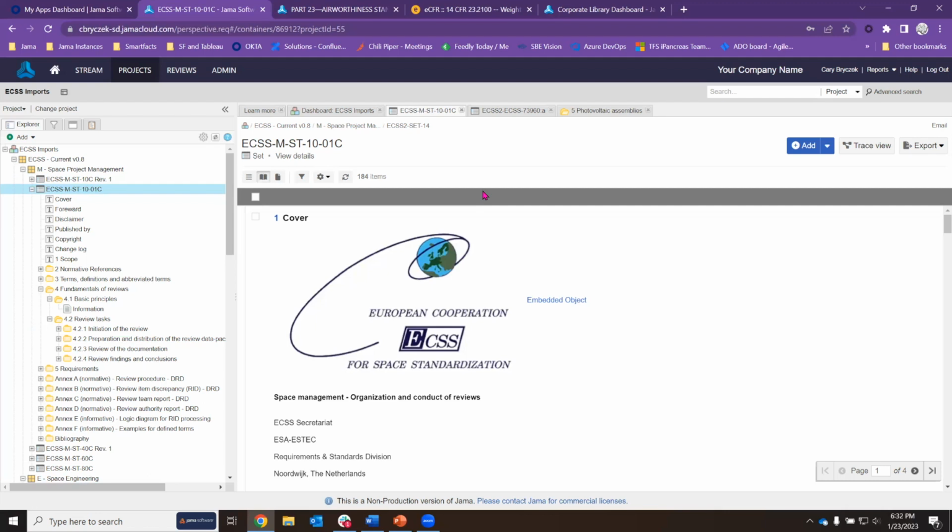And now suddenly the development team need to follow certain procedures, which they wouldn't have needed to do if that safety critical function would have been allocated to a different part of the system, kind of through the architecting process. So, I mean, this is pretty complicated, actually.